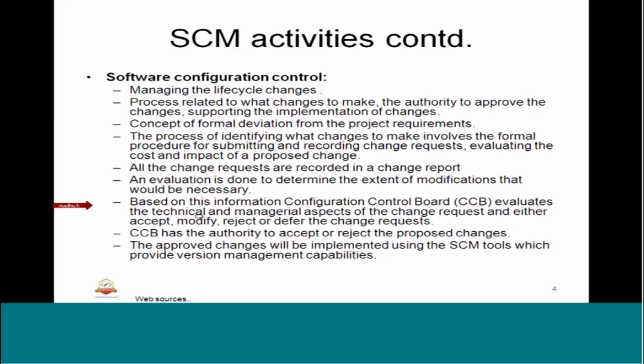So basically the CCB evaluates the technical and managerial aspects of the change request, and either they will accept or ask some changes in the updates that are required, or they may defer it or they may reject the change request. So CCB has the full authority to accept or reject the proposed changes.